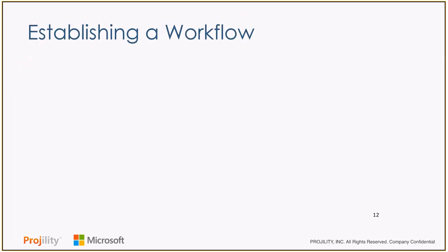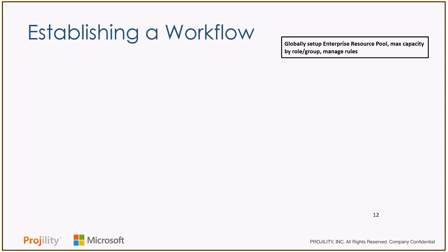And the most important part of this, and we'll state this a couple times in our presentation today, is establishing that workflow. Before we can start our workflow around resource management, we need to establish something called our resource pool. And we're going to set up a global enterprise resource pool within our PPM tool, within Project Online. That's where we're going to be setting up our resources.